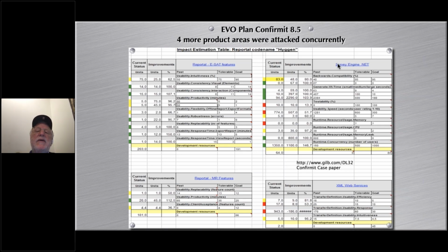If you realize this is week 9 of 12 weeks, in other words, they're 75% through their budget for time. And if you compute the average of these numbers, which you'll find is far greater than 75%, you'll find that they are, generally speaking, ahead of the curve. And by working on the weak ones in the remaining weeks, they're very much more likely to simultaneously achieve all goals they've been given, which they in fact do.